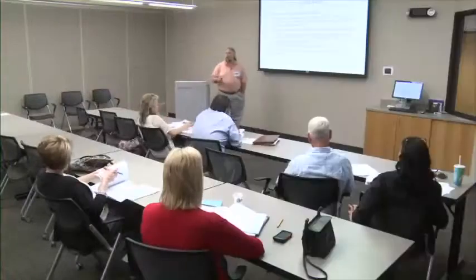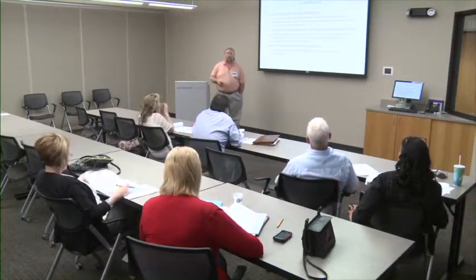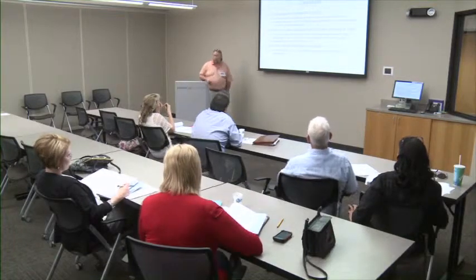And then, are your contract milestones met? Did you meet the points that you needed to do? Milestones aren't really activities, but we put them in there because they're things that we may have to do to make our contract. We have to have this bridge open at a certain date because that's the way they want it. Or we have to have this bridge completed by a certain date because the rainy season is going to start and we can't ford the river once the rains start coming.